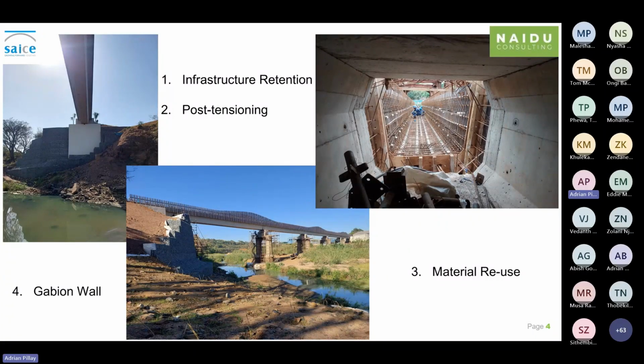In response, NIDA Consulting leveraged advanced 3D design software, drone imagery of the site, and building information modeling technologies to provide the first ever virtual briefing in eThekwini municipality. The original design proposed precast, pre-stressed U-beams with in-situ concrete decks launched onto retrofitted supports. However, upon site establishment, the contractor identified opportunities for improved efficiency.